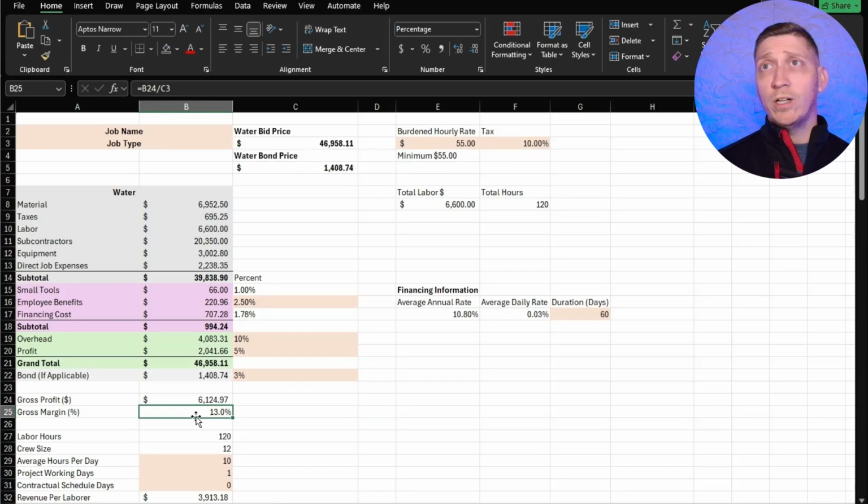Now, I'll make it a little worse when you do time and material. If you don't track everything exactly the way it needs to be. If you say, hey, this concrete ticket is for this part of the change order, and I know I'm going to get reimbursed and make 10% on it, or whatever, 10 and 5, that's cool. Except until they say, I don't think that ticket, because that day you weren't actually doing that. I don't have it on my daily logs. They're going to argue with you about it. Well, now you lost $6,000 and you lost that 10%. So now you're really losing money on the entire time and material ticket because you are running such a thin margin.